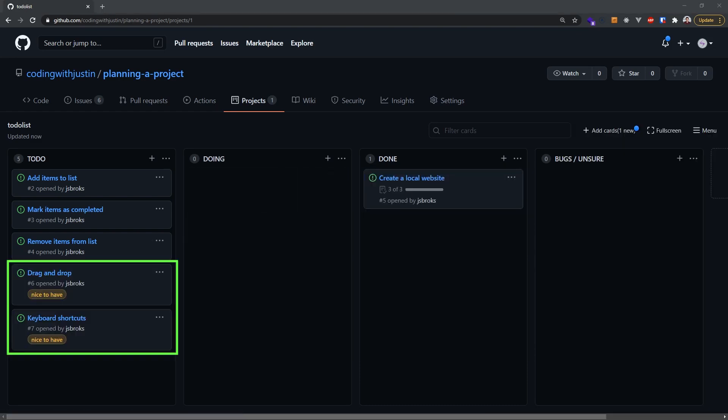I've also added some nice labels so we know which tasks to prioritize. The nice features we identified earlier don't really need to be implemented until the end. Then once we have done all the items in our list, we can move the card into the Done column and get cracking on the next one.